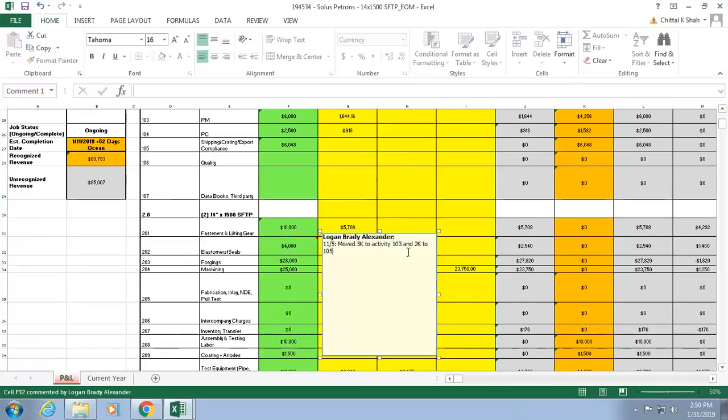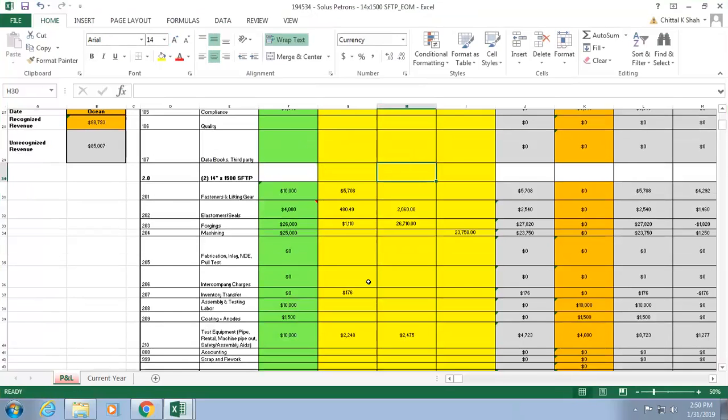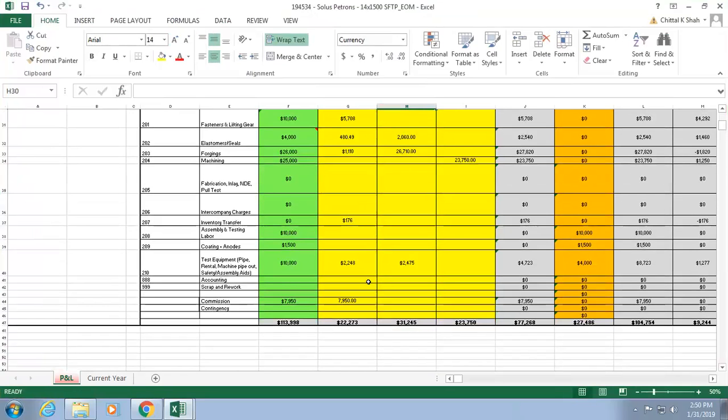They were off. But usually that's not the case. He was moving the budget between engineering and shipping. Initially, they would sometimes give a budget which might be off, and then we'll readjust it because we will know the actuals where they're coming in. Or we'll be using some buckets, let's say the elastomer guy is also making something else. So that will adjust the budget sometimes. But the total shouldn't change. The total remains the same, because our total budget is still the same.